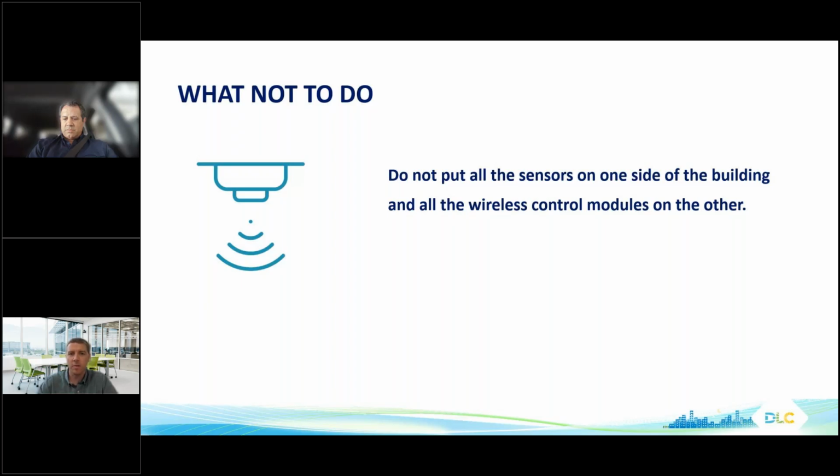What you want to try to avoid is one person has a problem with the way the space is working, so they say, hey, let's do it this way. And you make that one change real fast, and then 2 days later, you get a phone call from 3 other people saying, hey, that one change was good for them, but it jammed us up over here. So if you have to make a change, slow it down just a little bit and make sure it works for everybody.